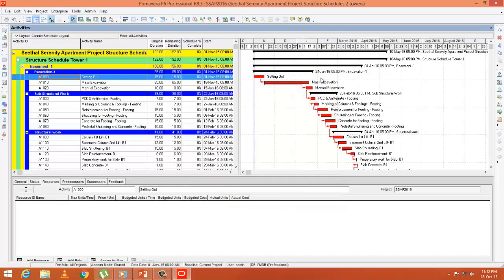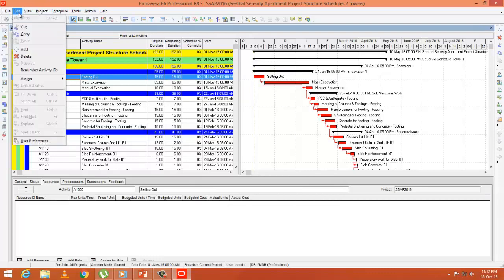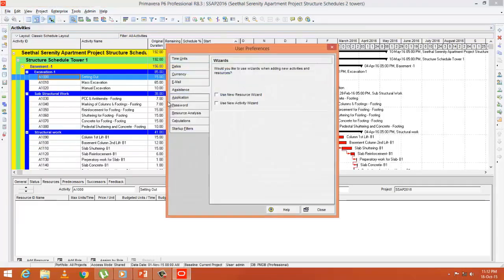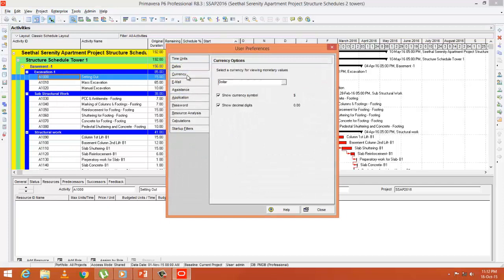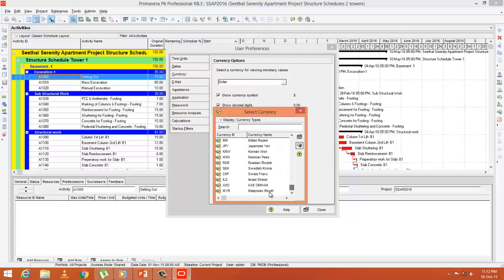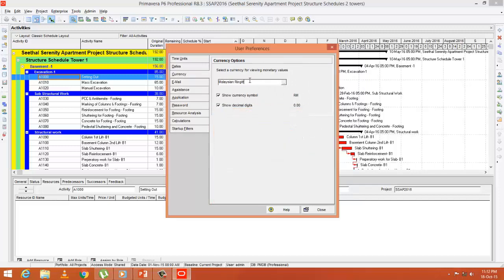Next we have to assign this currency. Go to Edit, User Preferences, Currency, and choose the currency you have created, which is Malaysian Ringgit. Choose and select. After that, you can close it.